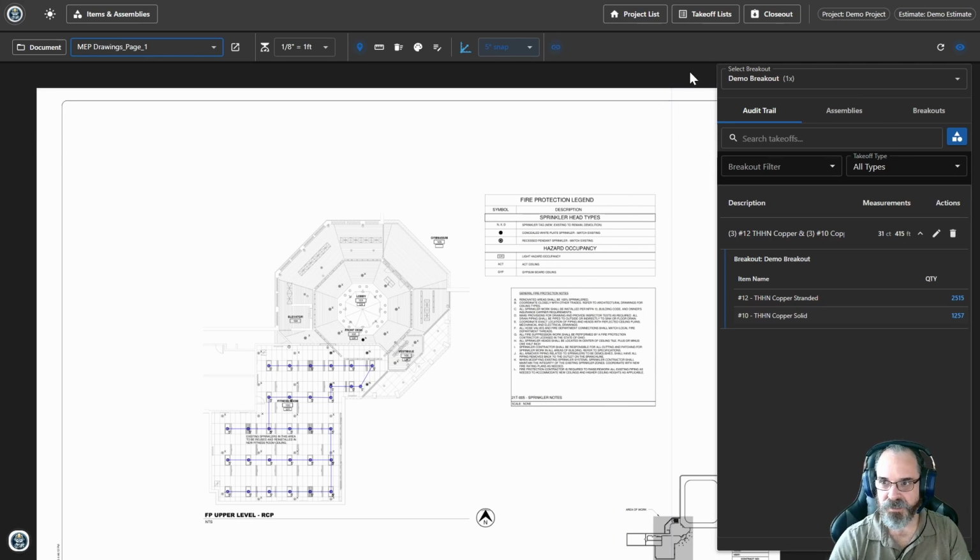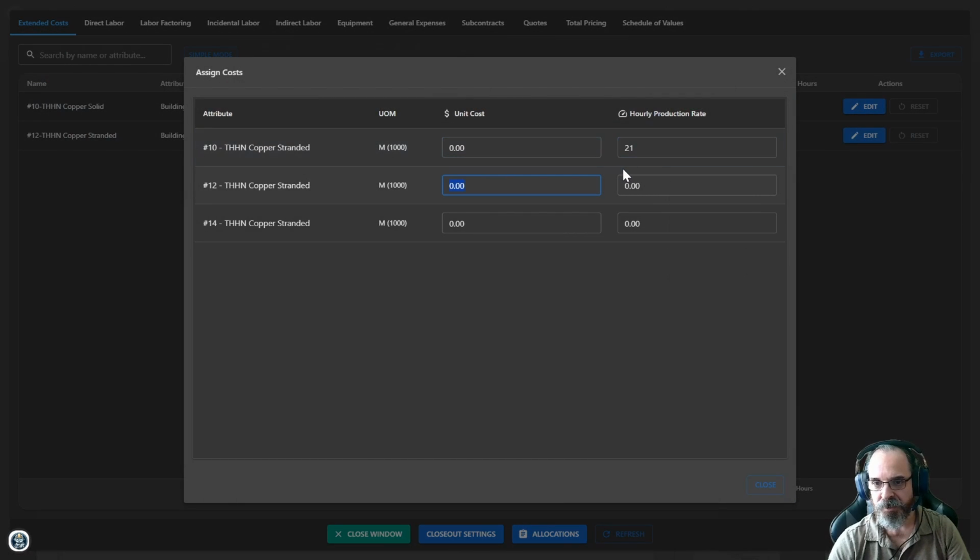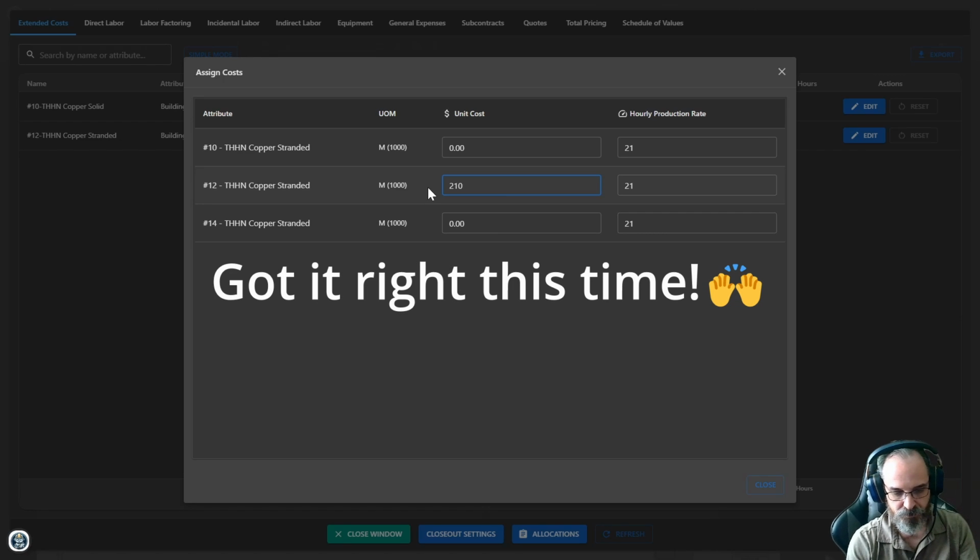So we need to finish this up. We need to wrap this up. Let's get a price. So if we go to our closeout now, you can see that. Let me hit refresh to make sure. Okay, so I don't have any cost associated with any of these, so I need to add those costs. And so let's go ahead and do that. So here I'll hit edit. We'll add our production rates, and actually this is per thousand. So if 200 and let's see. Math in my head.